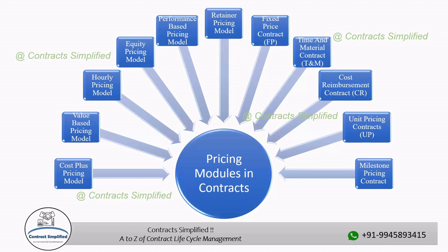The contract should include an estimated timeline for completing each milestone. This helps in managing expectations and ensuring the project stays on track. Before a milestone is considered complete and payment is due, the client usually has the opportunity to review the deliverable associated with that milestone. If the deliverable meets the agreed upon criteria, it is accepted and the corresponding payment is triggered. The contract should outline the payment terms, including the due dates for each milestone payment. These terms could be based on specific calendar dates, the completion of the previous milestone, or any other agreed triggers.